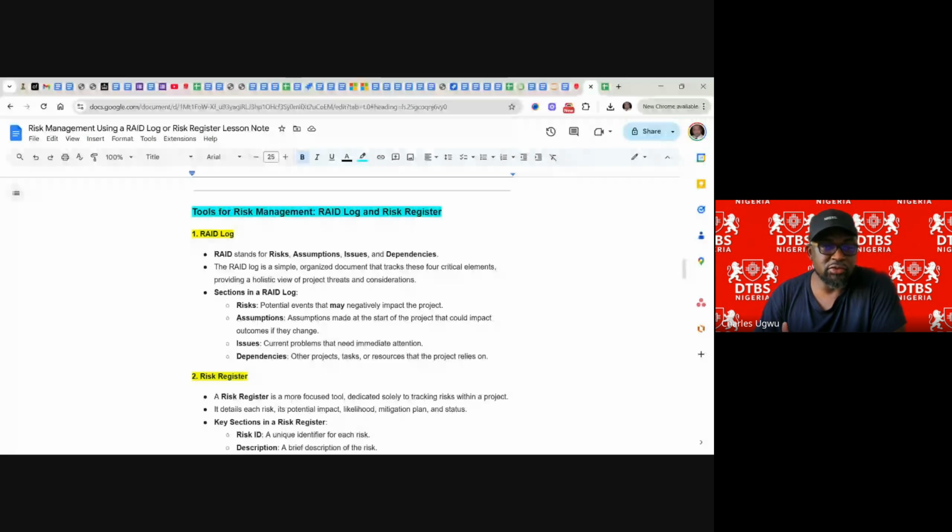So this is one project, but you see how some deliverables or activities depend on other ones. If the business analyst who is getting approval delays, the project manager who is waiting to start creating the project plan will equally be delayed. That is what we call dependencies.